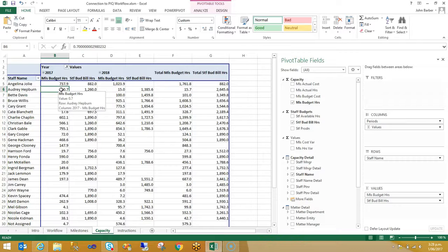It simply marries those two values up across time, where the budget's been set within the timesheet periods, and the milestone budgets have been set against their target dates, and it gives you an indication of capacity across the firm. There are some more complex and more in-depth formats available for capacity reporting out of these data sets, but we'll be covering that in a separate section.